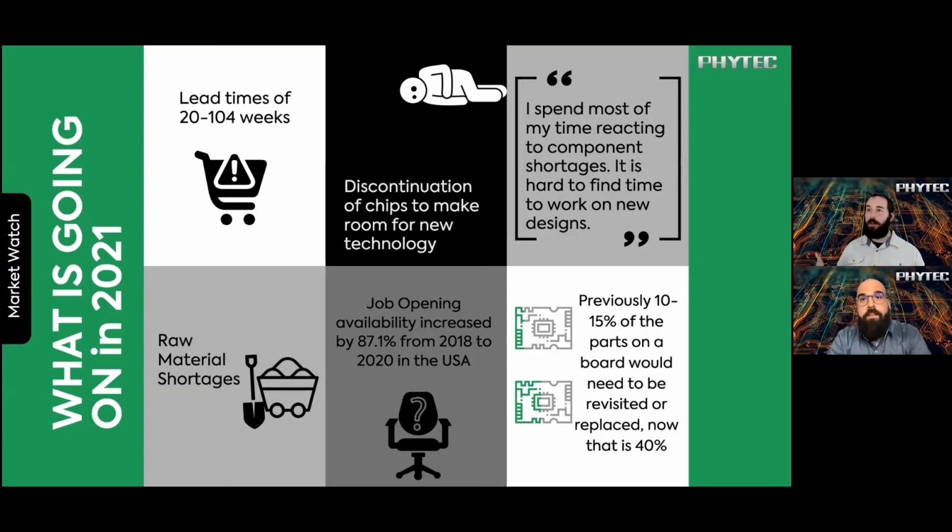So hold on, you said allocation market. Normally, like I said earlier, I go on DigiKey, I order my parts, they show up. Allocation is beyond lead time. Lead time is like, oh, it's going to take a while, but then the parts will show up. What's allocation? So allocation, if you go on DigiKey or to a distributor right now and ask for a specific part, they probably don't have it. So this means that the manufacturer and also the distribution channels allocate to their customers when they will get their parts. So it is beyond lead time.